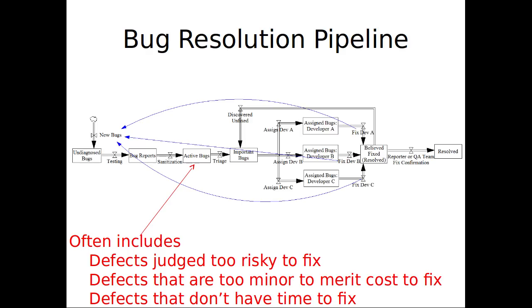So there's very real reasons not to try to fix certain bugs. You leave them. Or if they're going to be fixed, you have a team that is handpicked to study the situation really carefully, to oversee each other's work, and to very surgically and delicately try to fix the situation. And this is what teams will do if there's a bug and they're close to shipping. I want to emphasize this issue of being close to shipping. When I say shipping, I mean putting the system live for clients, providing them with the system to run, getting it close to deployment. If you're an internal IT shop, doing a large-scale rollout across your firm.